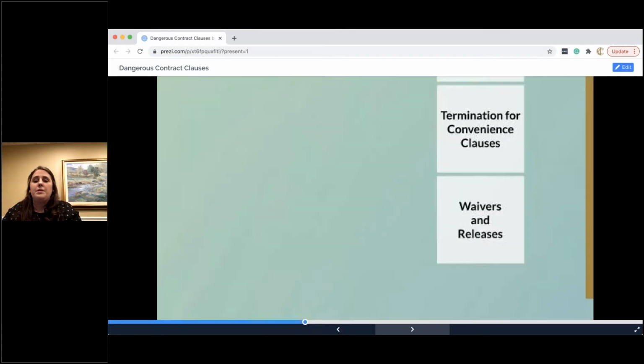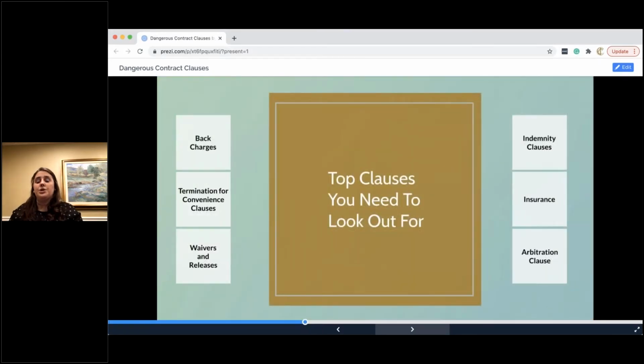It even gets to the point that when we go to court and we're arguing about terms of a contract, there's actual evidence rules that say other verbal agreements, other conversations don't get brought in as evidence, and it's called the four corners rule. The only thing we look at is what's inside the four corners of that piece of paper you signed. And so, you know, promises from someone up or down the chain are great, but at the end of the day, they hold no weight when your back is up against the wall for a variety of reasons.